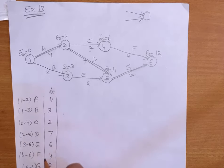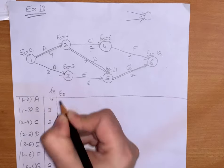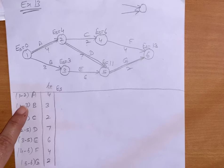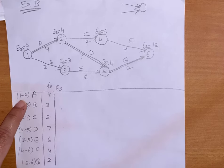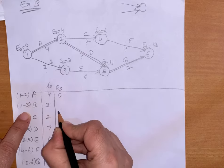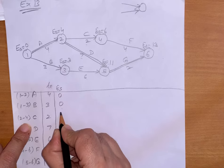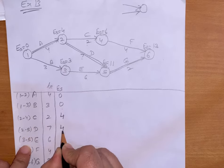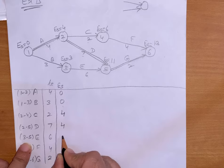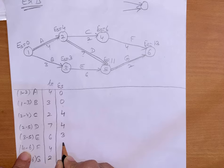Now we are preparing the table. For earliest start, you will record for the start event. So earliest start time for activity 1 to 2: ES for event 1 is 0. For 1 to 3, earliest start time for event 1 is 0. For 2 to 4, earliest start time for event 2 is 4. For 3 to 5 it is 3, for 4 to 6 it is 6, and for 5 to 6 it is 11.